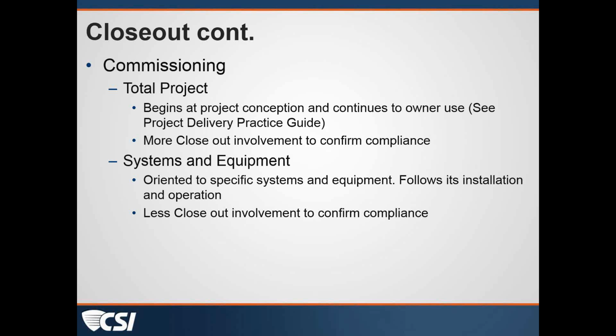They are created from on-site measurements. Record drawings are prepared by the architect and reflect on-site changes the contractor noted in the as-built drawings. They are often compiled as a set of on-site changes made for the owner per the owner-architect contract. That's consistent with what Jim and I have said.